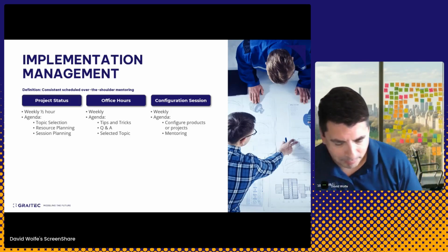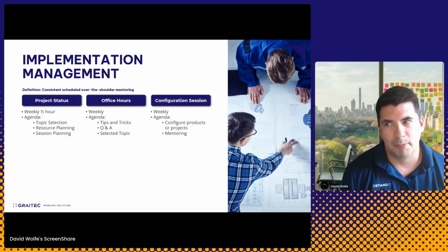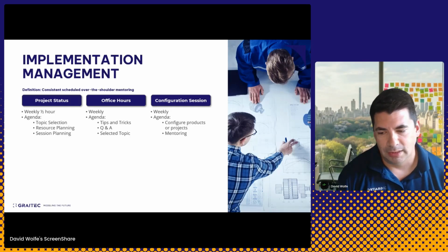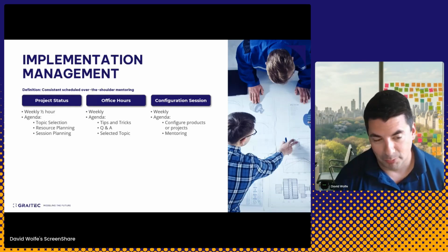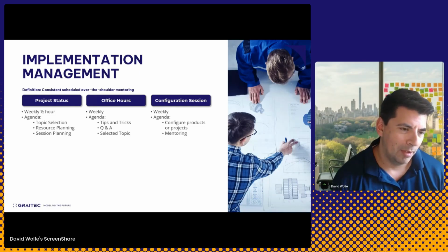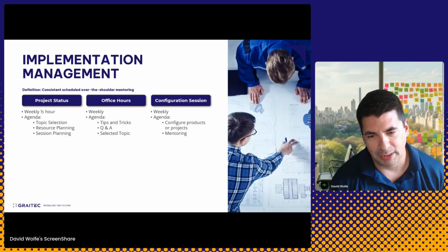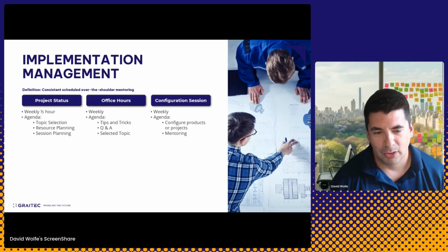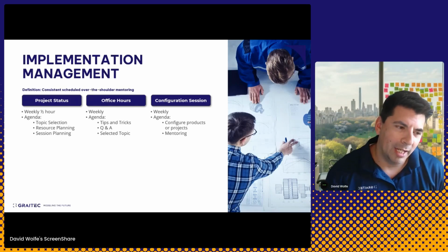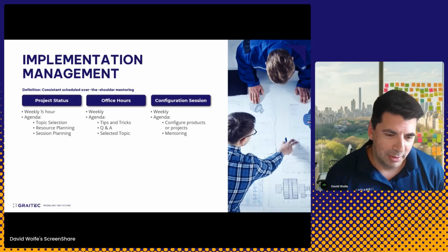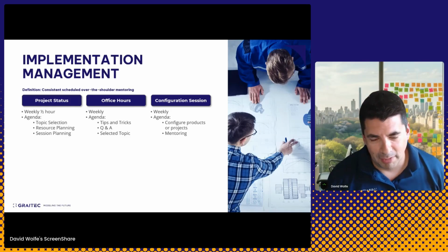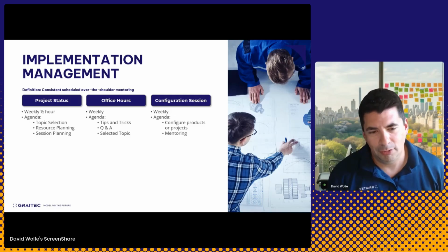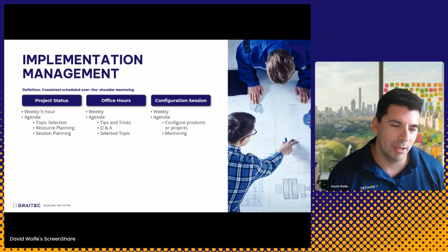The other part of this is the other risk that comes up that we don't often talk about, and I know you guys are going to be like, okay, yes, that happens. When projects get really busy, what we see is people get too busy to actually do the work and configure this stuff ahead of time. And so you'll be like, can I put this off for 3 or 4 weeks? We got really busy. And then what we tend to see is in 3 or 4 weeks, it's time to get drawings out. And then the list of things that we didn't do over the last 3 or 4 weeks ends up becoming very visible because we can't get the drawings out.